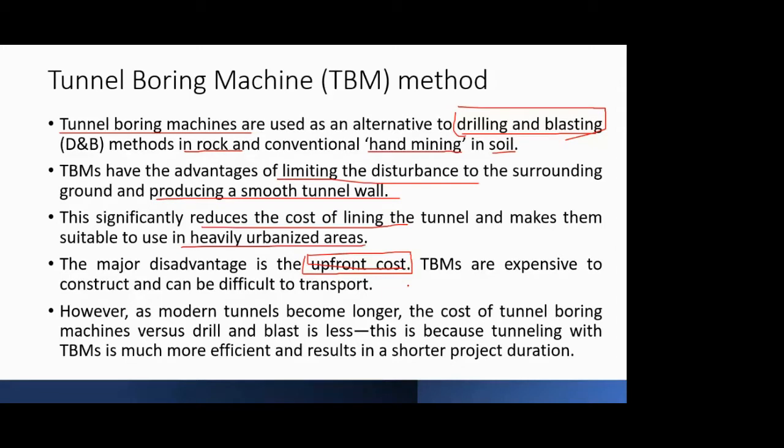But if you compare the long-term scenario, the life cycle cost, so nowadays for longer tunnels, say 10 or 20 kilometers, if you apply the economics and evaluate the cost for drilling and blasting versus the cost for TBM, you will surely find that the TBM is more efficient, because the rate at which construction can be completed is quite a shorter duration compared to drilling and blasting or even the hand mining method.